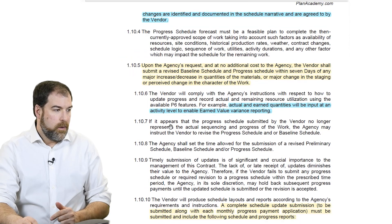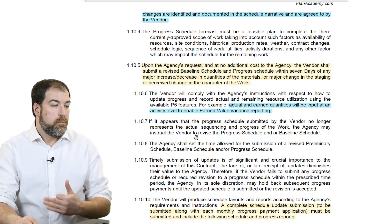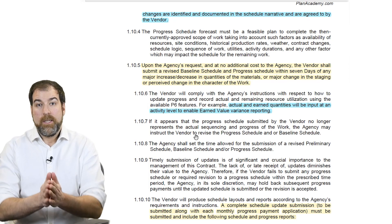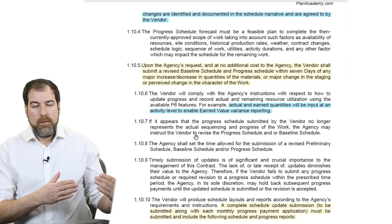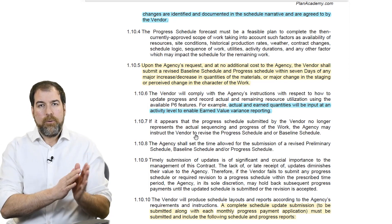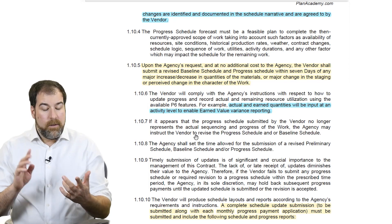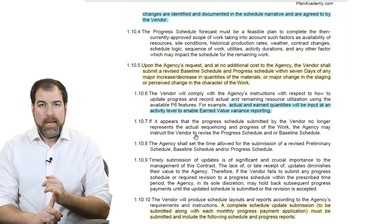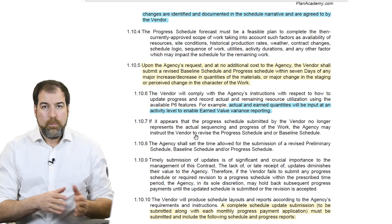Scrolling down, this line also highlights the importance: if it appears that the progress schedule submitted by the vendor no longer represents the actual sequencing and progress of the work, the agency will ask you to go fix it. Owners — or whoever's on the other side — need an accurate as-built schedule that represents exactly what happened in the field. It can come up in legal cases, disputes, claims, delay, forensic delay analysis — all this stuff. So it's up to you as the scheduler to make sure you're doing it right when you progress.